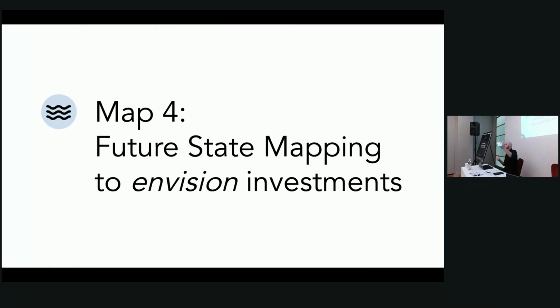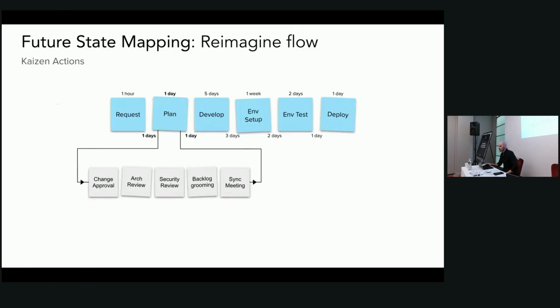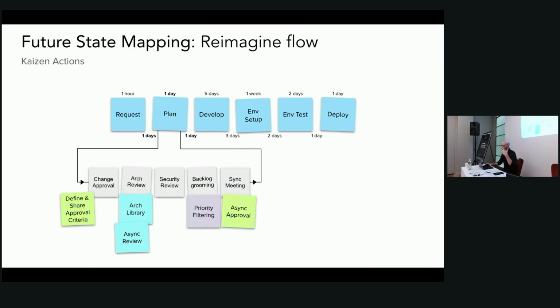We've spent all this time in the problem space. How do we understand with high degree of clarity and confidence what's happening, what's holding us back? And future state mapping is really where we start to talk about what are we going to do about it. So we'll take our value stream and the dependency representation of detail, and we can attribute these ideas and questions, these potential interventions, to very specific areas that we've highlighted as our hotspots, as our areas of challenge. So this can give us an understanding of what are we actually going to do about this? What could we do about this?